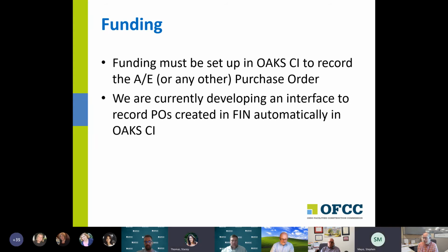And again, as we've designed it, every time you push a new record to OCI, we're going to change your budget. So if you execute an LFI MOU and your LFI amount changes, I'm guessing that you're distributing that new money within your budget somehow. So I'm expecting that you would want to do an update to your budget on whichever buildings were affected by that LFI MOU.